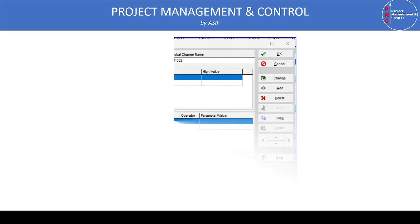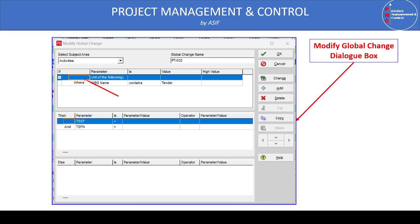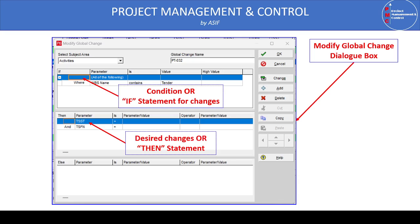Once you click Global Change in the Tools menu, the Modify Global Change dialog box will appear. This dialog contains a 'Select Subject Area' which covers activities, resources, and project expenses, and a Global Change name field where you can assign any name to help you remember why you created this Global Change. The dialog box contains three main areas: the 'If' condition — for example, if the original duration is greater than or equal to 30 days — and the 'Then' statement, such as 'then the activity duration will be 20 days.'